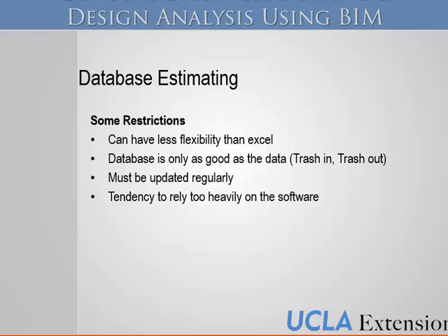So who gives me the data for the new pricing, or for the actual pricing, through the activities of the project? The subcontractor. So he gets the budget from the estimator, and then what it actually comes in at should be based off of that subcontractor's proposal, plus any change orders, or plus any things like that. Does that make sense? Yeah.